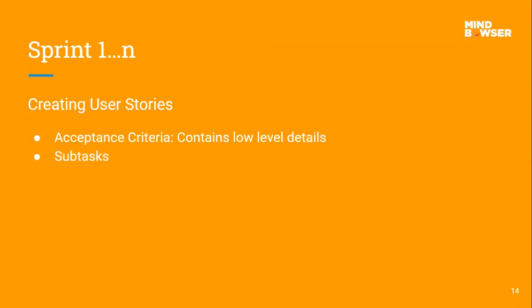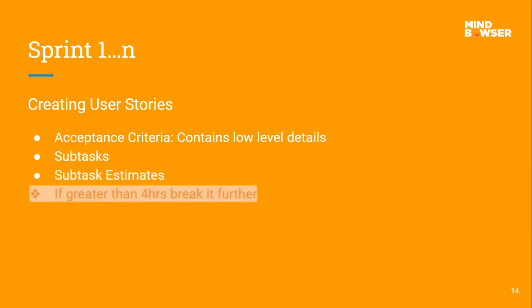We write it, and then it is done with the team itself. The whole development team sits together and discusses the acceptance criteria. Every developer, from the backend, writes their own subtasks. The front end writes their own subtasks, and together we do the estimations as well. But here are a few pro tips we've been following.